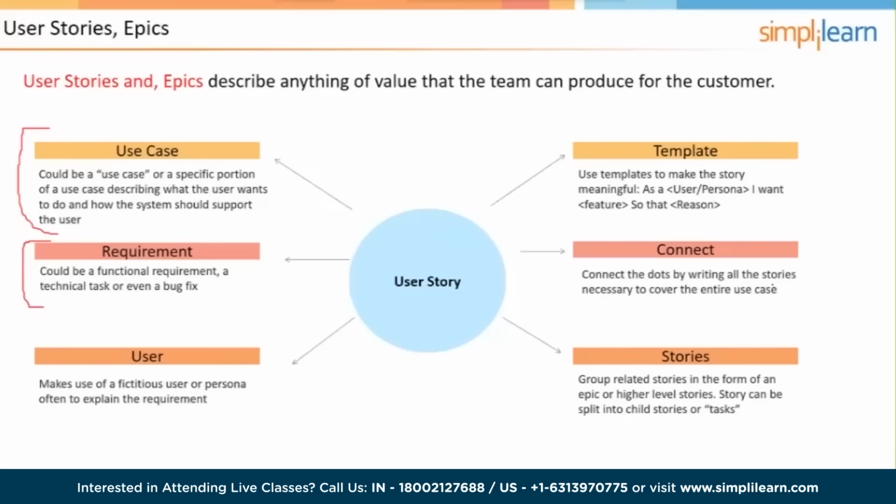Now, what could happen is that the product owner ranks these in priority. So this one first, then that one, then that one. And the team says, well, the only thing is that we have to do some development work before we can actually do user story 2. And so what we really need to do is insert that before the second priority user story. And so the priority of the user stories in the product backlog, while it might start with just being simple functional user stories coming from the product owner, it will evolve until it includes some other things that are also considerations when it comes to priorities, because of successor, predecessor relationships, dependencies, and things like that.